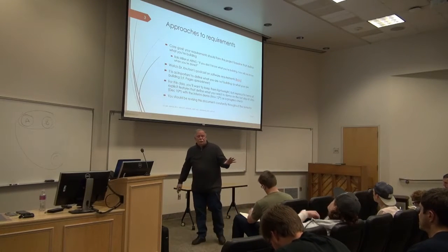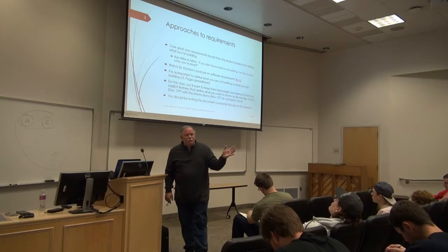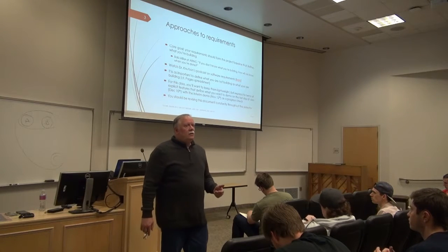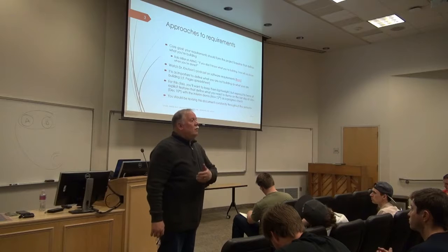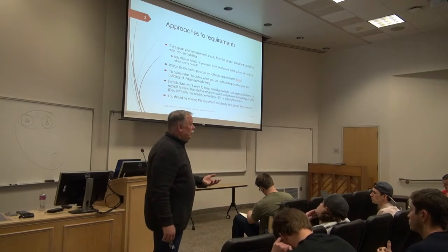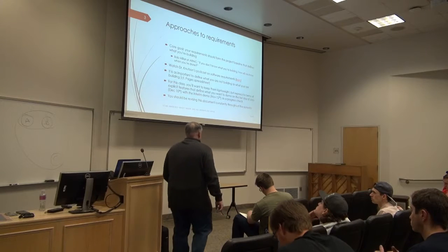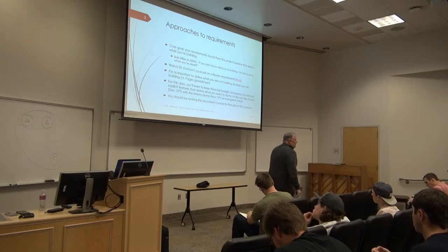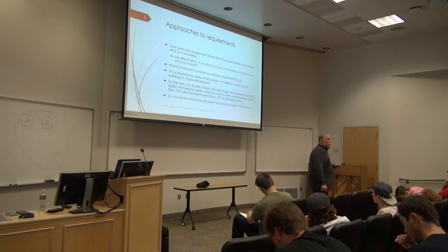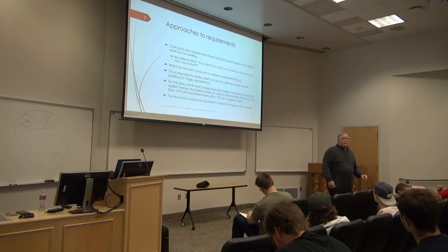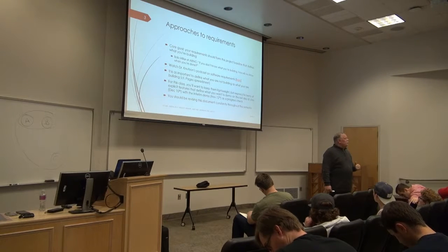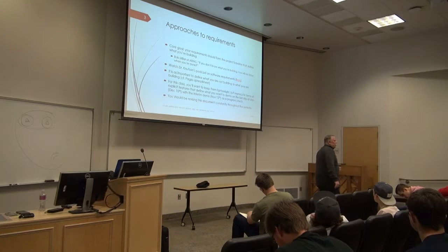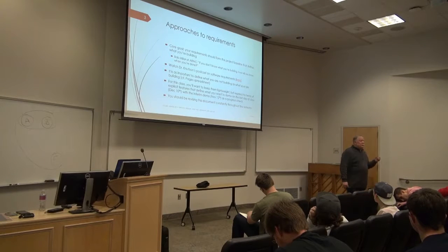Again, at Pages, we were doing this desktop publishing thing. We finally closed on venture funding after about a year and a half. Hired our permanent full-time CEO, Larry Spellhog, who came over from Xerox, where he had been the product manager for Xerox Ventura Publisher, which is their desktop publishing system. And one of the things he immediately required that we do, we as a development team, and actually as a whole company, was build a spreadsheet of basically every possible feature you could put into a word processor or desktop publishing system. It was 600 plus features.